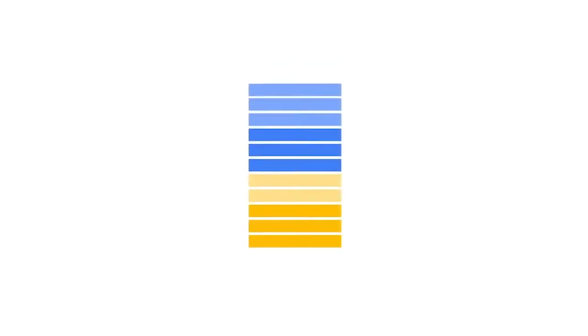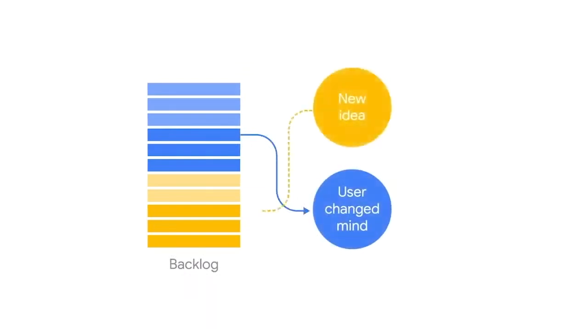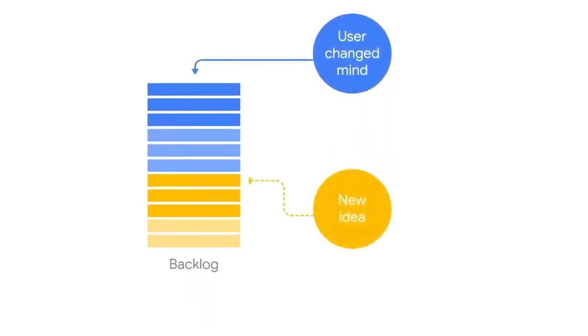In Agile, requirements are treated as more dynamic and expected to change as the team receives feedback and new information. There is usually an initial set of requirements or feature ideas when the project kicks off, but that list of requirements and features is continuously growing and changing throughout the project. The team works with stakeholders to prioritize the requirements, always moving the most urgent or valuable items to the top of the list.